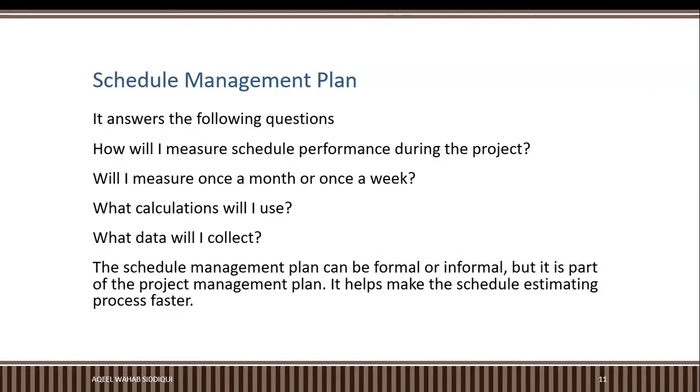It answers the following question: schedule management plan. How will I measure schedule performance during the project? Will I measure once a month or once a week? What calculations will I use? What data will I collect? The schedule management plan can be formal and informal, but it is part of the project management plan. It helps make the schedule estimates process faster.